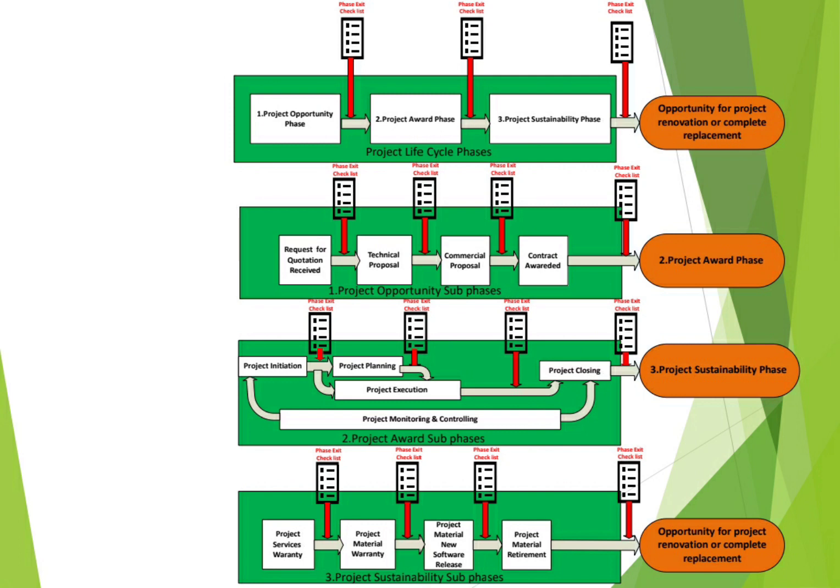So it will show the project manager, under him or beside him the technical lead for this project, the support function who is going to issue the invoices, also the escalation point if there is any problem with the PM. The customer needs to have an escalation point, and so on. So this organization chart will show the structure of the project execution team and also the escalation managers.